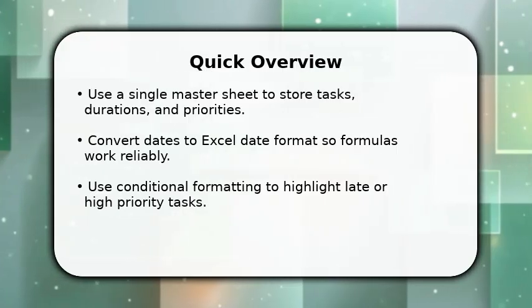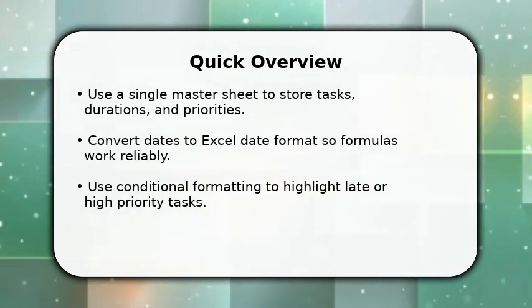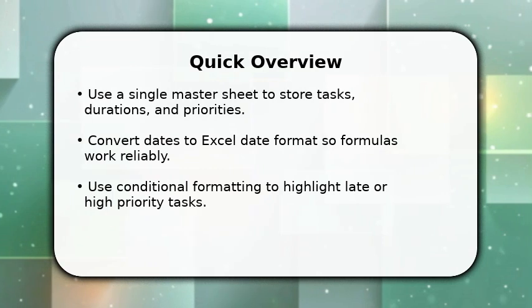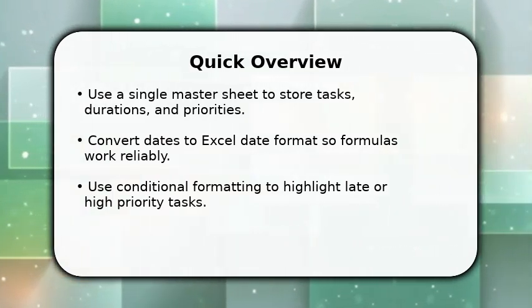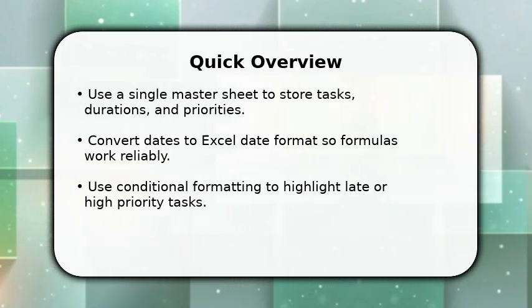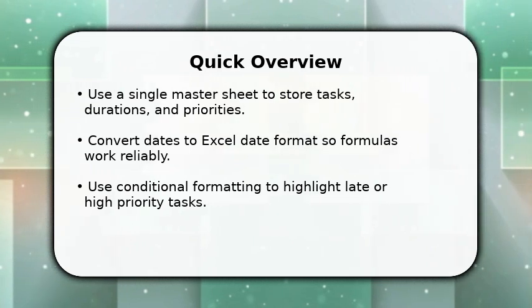In this video, I will show how to do scheduling in Excel only way. Start by listing tasks, start dates, durations, and priorities in one table. Then convert dates to Excel date format and name your range for easier formulas. And finally, apply conditional formatting so deadlines stand out.